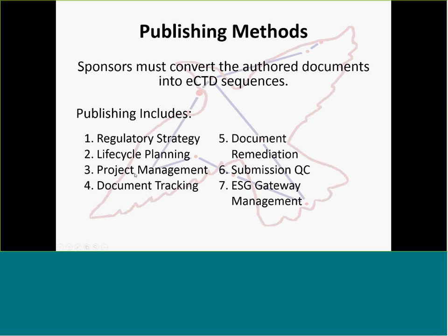Project management, and this is a critical function. The regulatory operations and your publishing group in general provide project management for the actual publishing steps. Just as an example, a typical NDA, like a big NDA of a couple 100,000 pages, will take around 2,000 man-hours just to go from source documents to final submission.